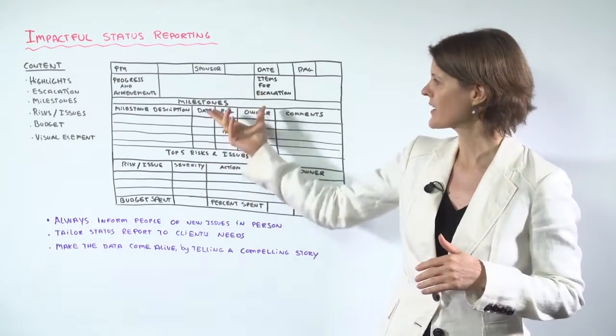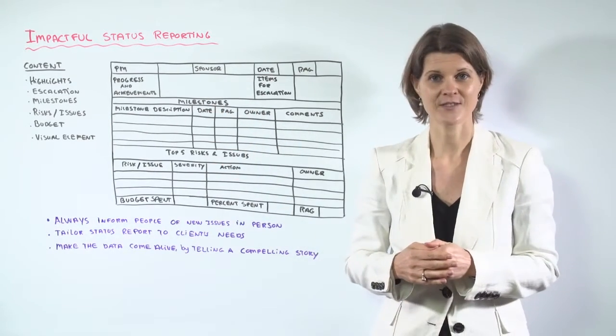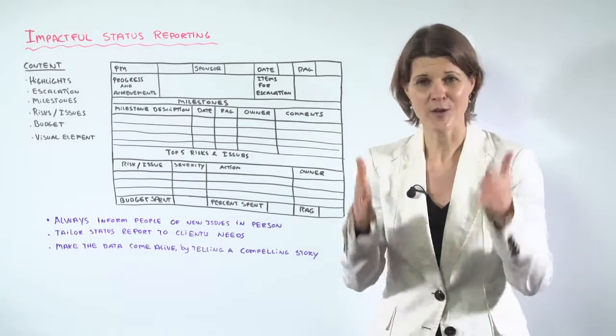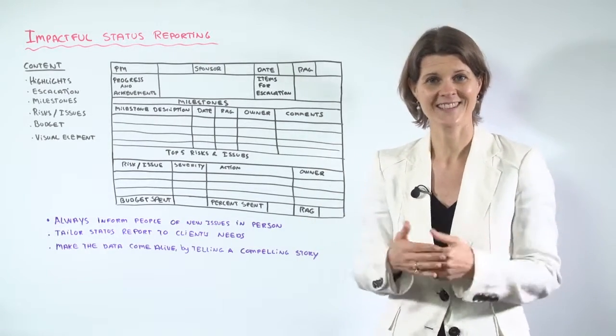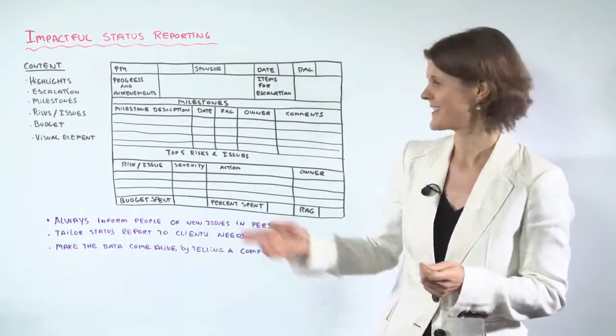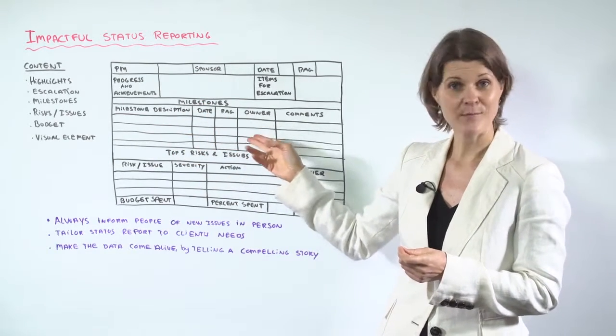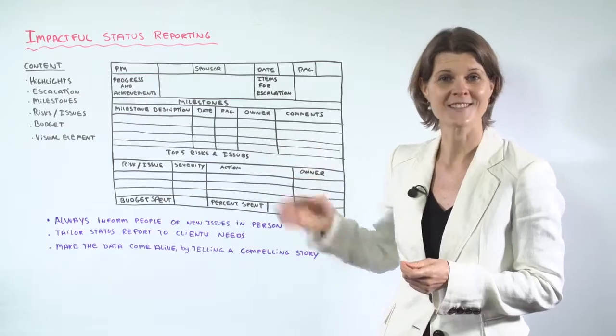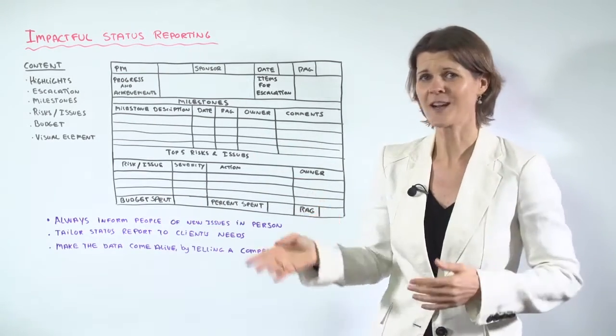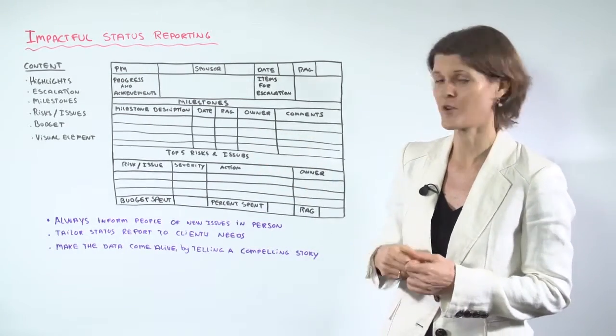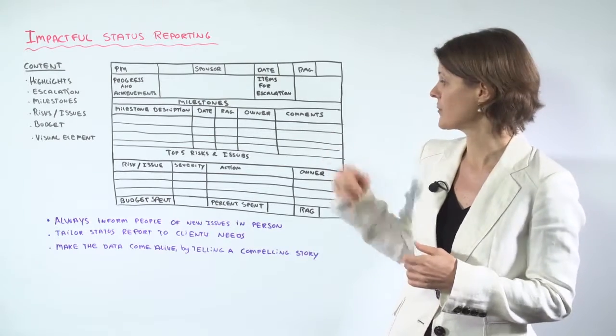The majority of the report here is allocated to milestones. Executives want to know if your project is on track. There is no better way of showing that than highlighting the milestones, the date, red amber green status and who the owner is. If a milestone is not on track, we want to know who to go to for an answer and then any comments you may have.